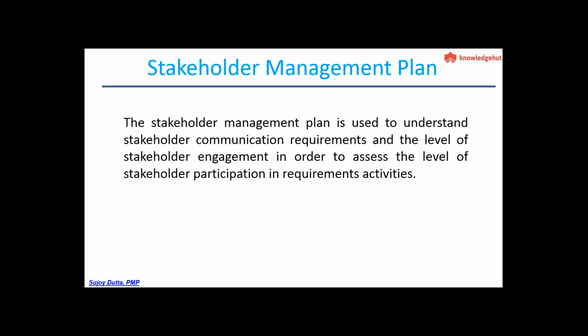So do you make a checklist of the items that a customer would normally be checking for before accepting the deliverable as correct and fulfilling his requirement? Yes, that is very good and that is very important. Just like you make your risk register, similarly you can use an Excel template and list out the user acceptance test criteria, classified either by milestone or by phase of the project. Okay, so let's see.